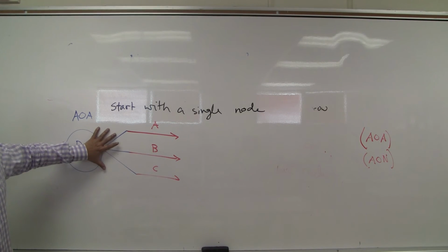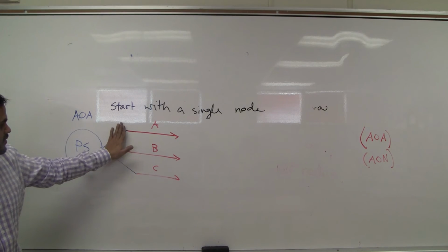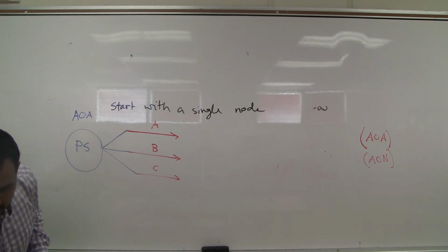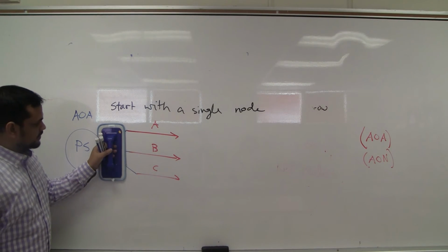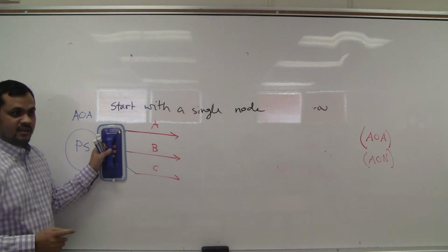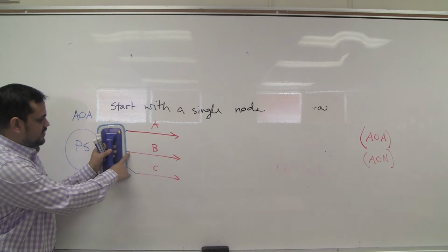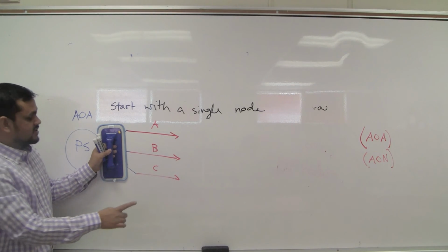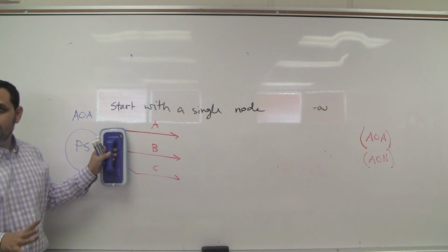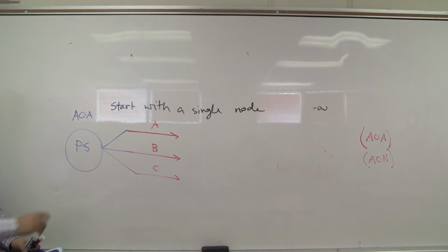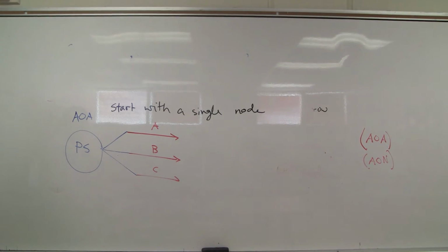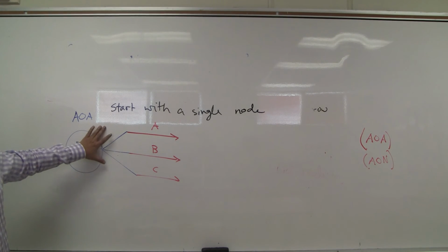Now if you do not do it, what is the problem? Say we cut this part. If I start from here, you may think I am starting here. Somebody else may think I am starting from here. Somebody else may think I am starting from here. So it is confusing. Better to combine. That means 3 activities are starting at the same time. That is for the arrow diagram.